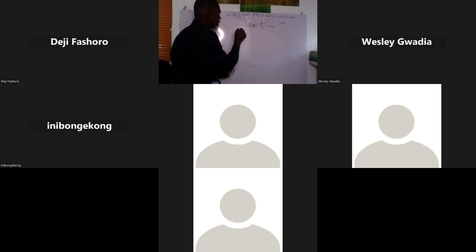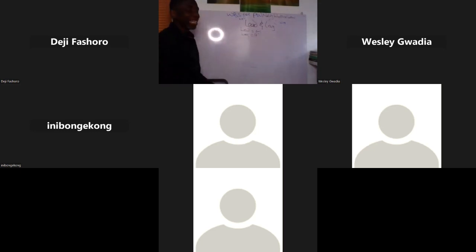What did I say lead is? Lead is the amount of time a project is delayed. No, it's advanced. Advanced. Lag is delayed. So just carry this formula. Lead carries a negative sign. Lag carries a positive sign. Lead means it's been advanced.